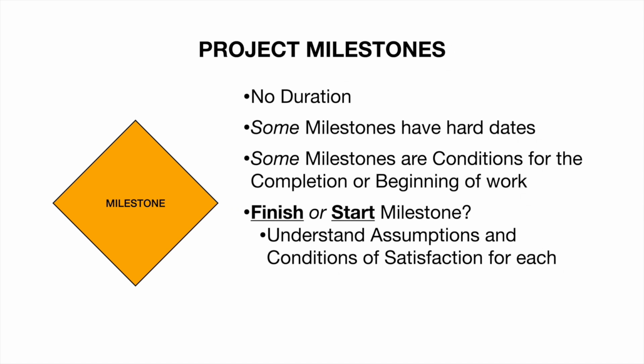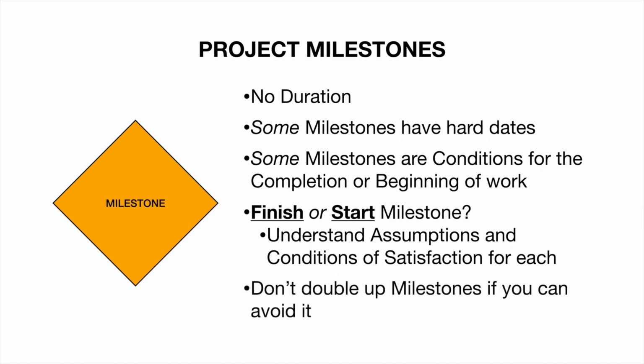And be wary of having finish and start milestones for each phase of work. Typically, the start of a milestone could be seen as another's finish. So don't double up on milestones if you can avoid it. That might be a good place to combine two milestones into one.